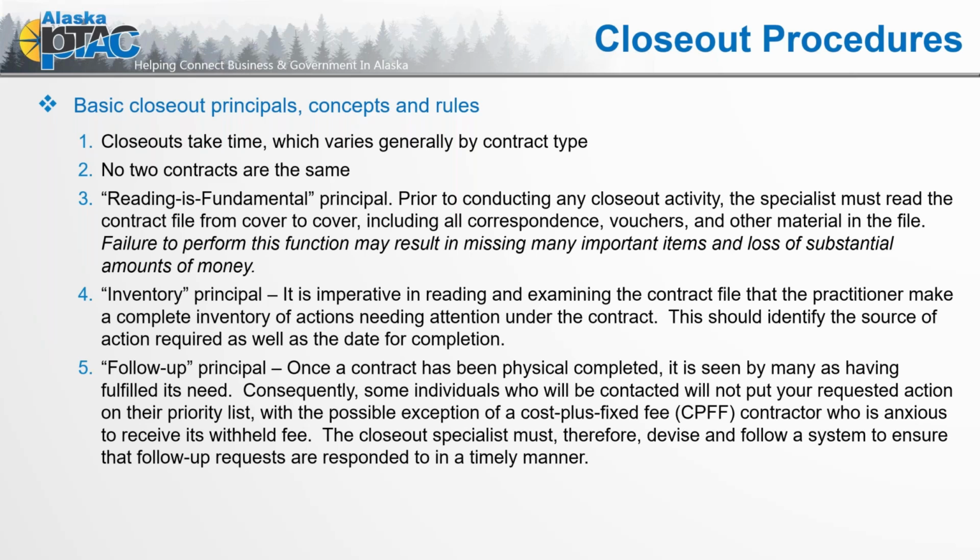Now, the reason I put that in full in text, even since most of the audience here is businesses, is we don't follow up. So again, like the one company that had all of this additional work that they did, it was just a short contract, they didn't follow up to verify that the work was completed, to get something in writing, to get anything from the technical, from the agency side. And here we are years later. And ultimately, I don't think they were ever able to recover those additional costs because there was no documentation.